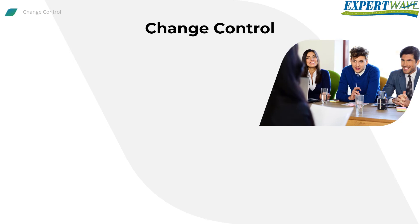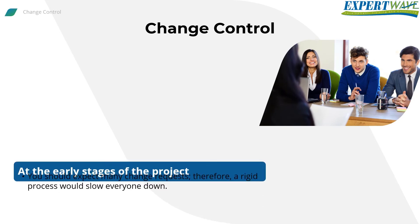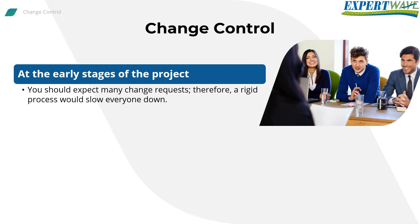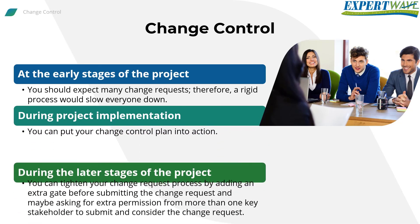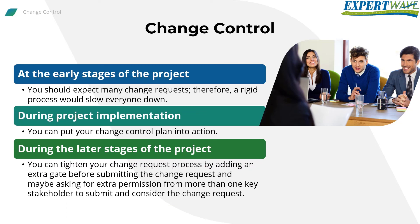The change control process doesn't need to be implemented rigidly from day one. At the early stages of the project, you should expect many change requests, so a rigid process would slow everyone down. It's recommended to simply notify stakeholders of changes during early implementation. During later stages, you can tighten the change request process by adding an extra gate before submission and requiring permission from more than one key stakeholder to submit and consider the change request.